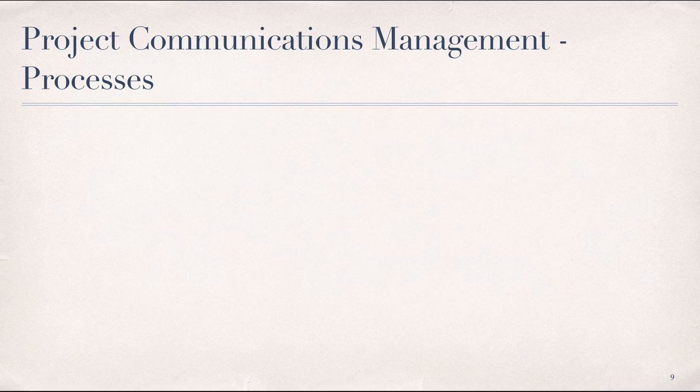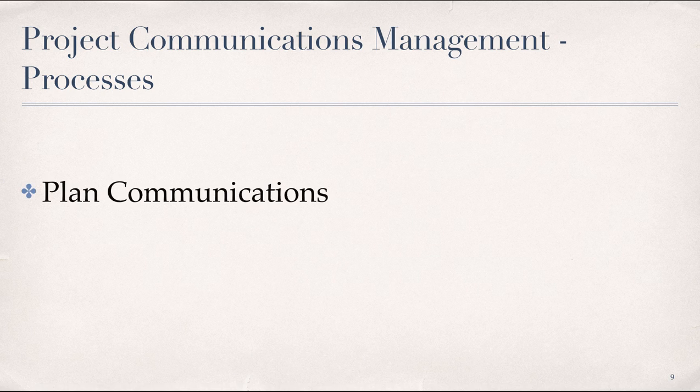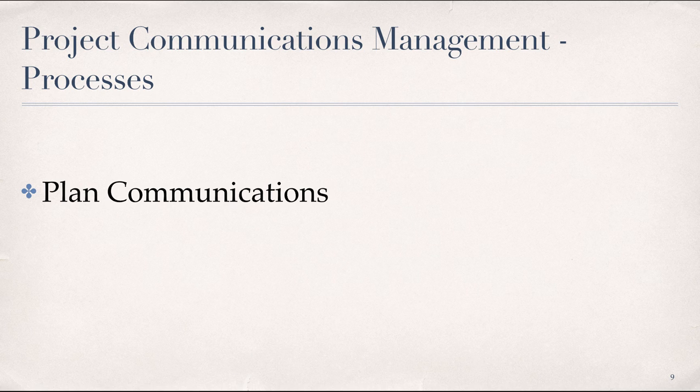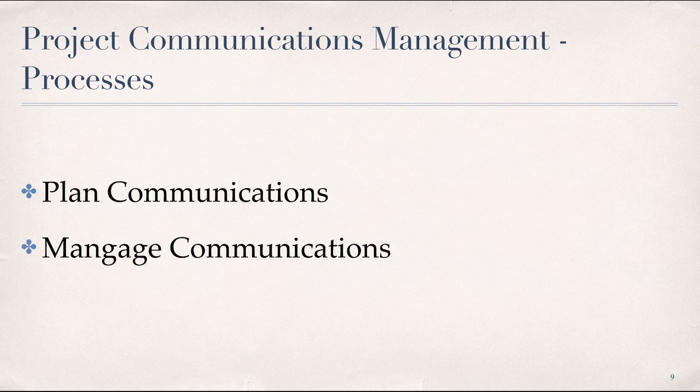So with that, the three project communications processes are plan communications management, which is the process of developing an appropriate approach and plan for project communications activities based on the information needs of each stakeholder group, organizational values, and the needs of the project. The second is managed communications.